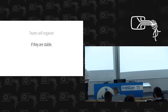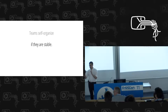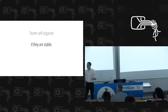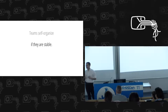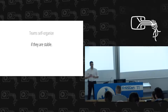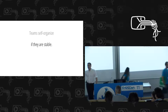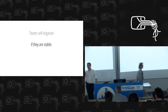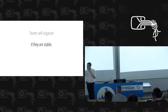In Scrum, we have a time-boxed period called a sprint, which is our central unit of planning. The Scrum Guide says a sprint is one month or less. If your company is using sprints longer than one month, congratulations — your company is not using Scrum. Because remember, rules, roles, artifacts, and events are immutable, and if you change anything, that's no longer Scrum.